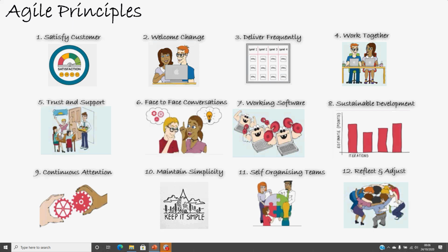At the end of every sprint, you have a review, and then there's something called a retrospective, which is also a review meeting where the whole team sits together and reflects upon what they have achieved in the previous sprints. Based on that, they see what did work for them and what did not work for them, and then for the next sprint, they improve their ways of working.